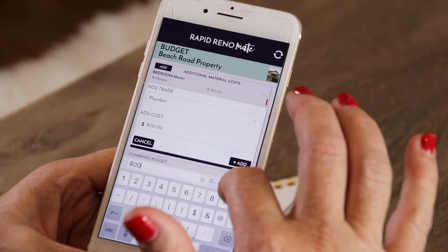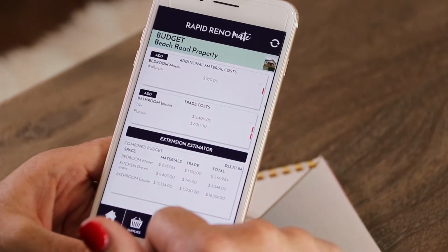But for those of you who haven't renovated much, whether you're renovating for wealth, renovating for profit, or just because you want to create an amazing home for yourself or your tenants to live in, it's so important that you renovate with a buffer. So I recommend that if you're starting out, renovate with a 15% buffer. That's 15% of your total project cost should be a contingency. So make sure that you also enter that in as a line item inside your app for your budget.